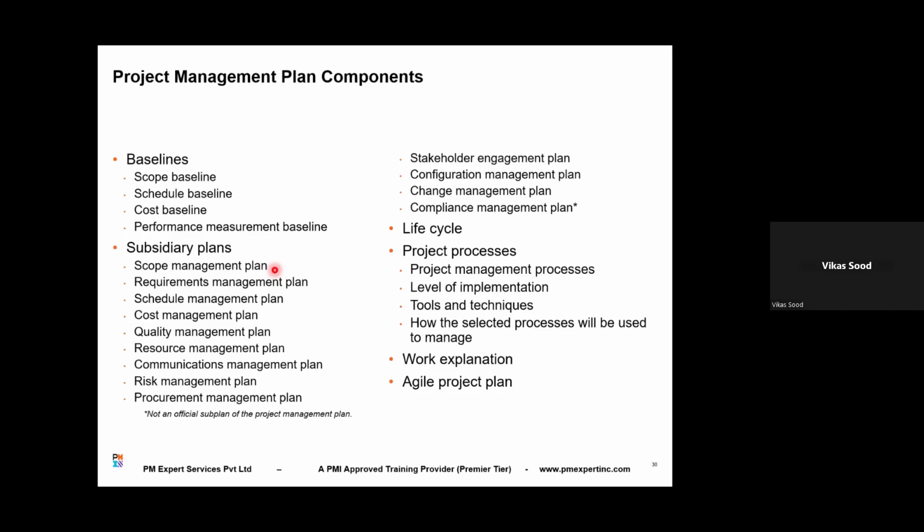No. It will only contain the process, for example if there is scope creep, what to do in this case. Yes, it will only contain the process to manage scope. That's why I'm using the word rules of the game. Now, where is the scope defined? In the scope baseline, the scope statement, right? I'll show you, the scope baseline includes the scope statement, your work breakdown structure, and the WBS dictionary. We'll talk about this. Scope is defined in the scope baseline, right?